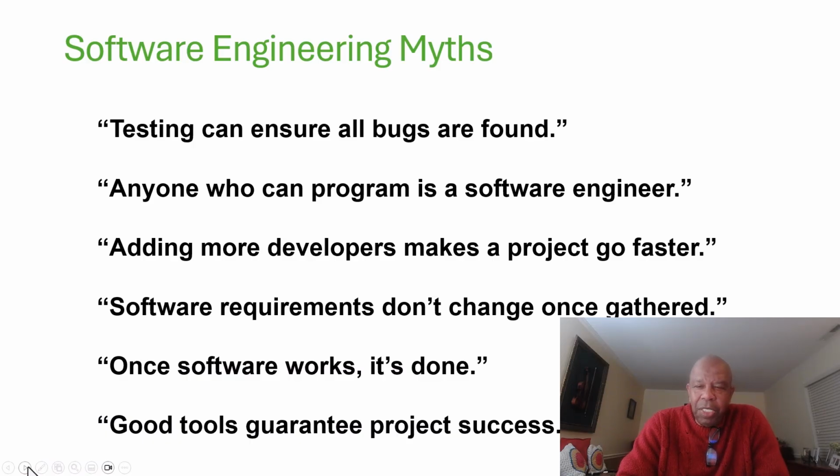Adding more developers makes the project go faster. That's probably the opposite. The more people you have on a project, the more communication you need, and the more probability that communication fails. So that is one of the myths of software engineering.